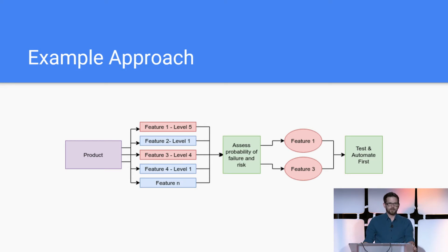The theme this year has been that everything is rapidly moving into digital disruption. We don't have time to test every little thing. So if you're planning your testing cycle, test areas that are going to potentially cause the app to crash first, not whether a screen has the right color on it. Obviously, if you can get to all that, that's the ideal world, but projects and releases move fast, so you may not have time to test everything. The whole point is to try to reduce your risk.